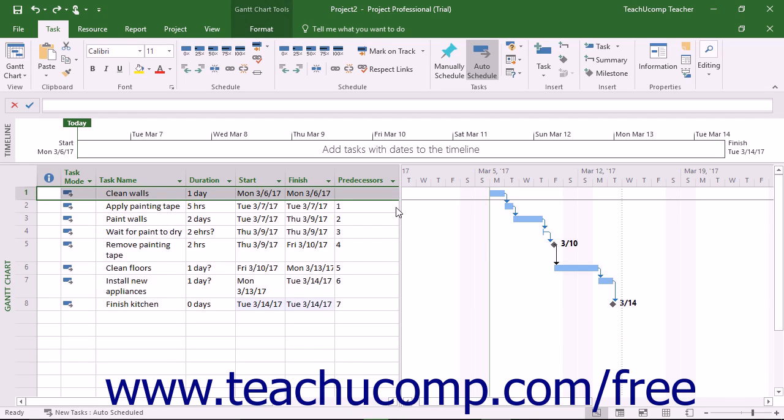and then save the task. If you need to insert a new task above the first subtask in a phase to enter the summary task, click the task above which you want to insert a new task.